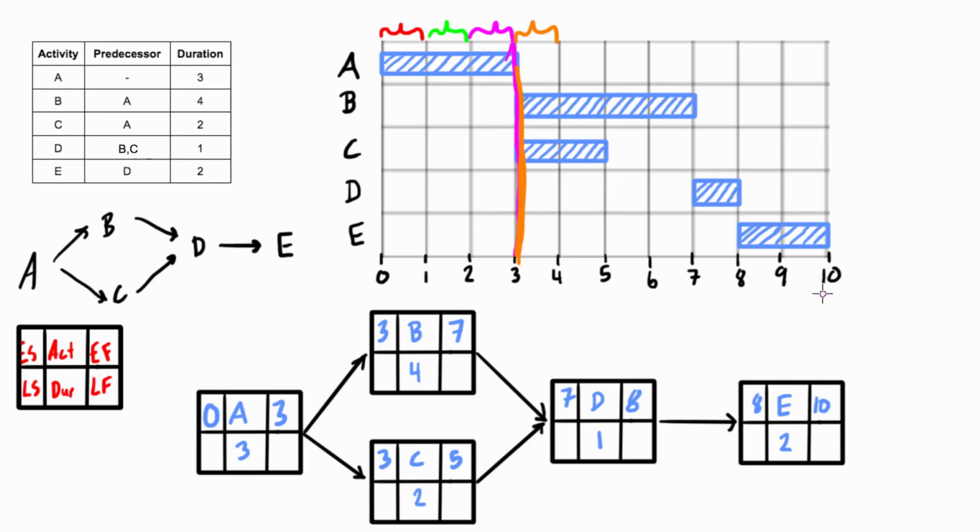So in conversation, if you were to say how many days is this project, you would say it's 10 days. It ends at the end of the 10th day. If there was another activity coming after it, that activity would start at the beginning of the 11th day, and we would also use that 10. We would carry it forward just like we do from here to here, from the early finish to the early start, and we'd carry on.